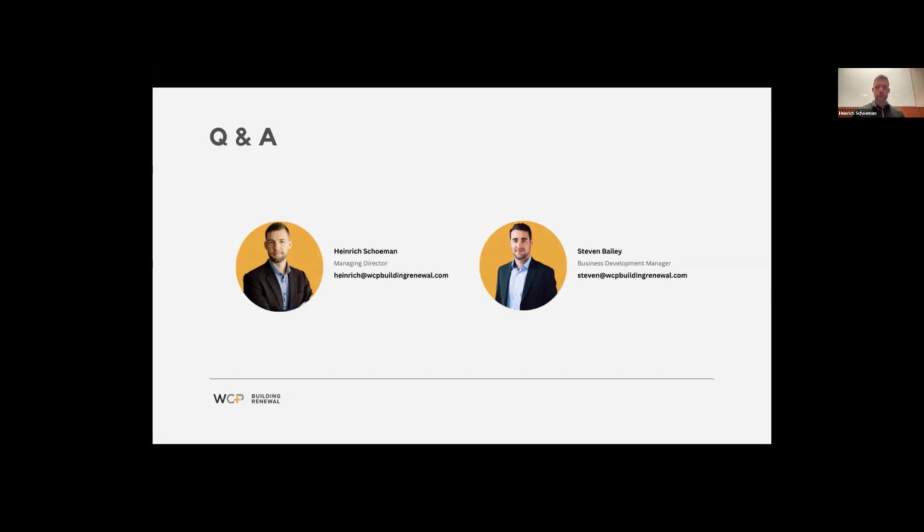Yeah, we didn't speak to it in this presentation, but we certainly have in others. The question is always, when is the right time to get an inspector involved? Generally we do it at the onset of a project, and it's usually when there's a high level of complexity, or it's quite a sizable project, hundreds of thousands of dollars in project size.